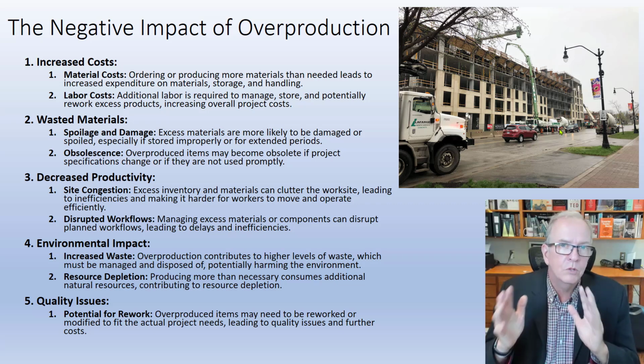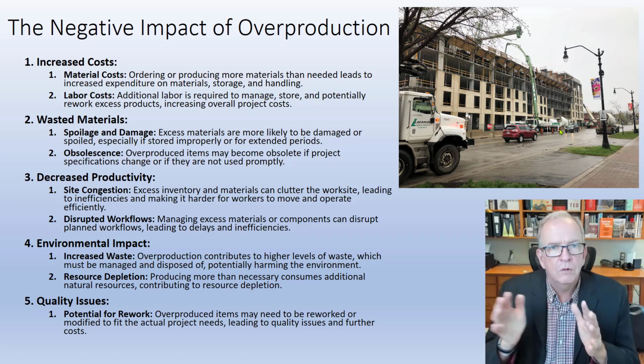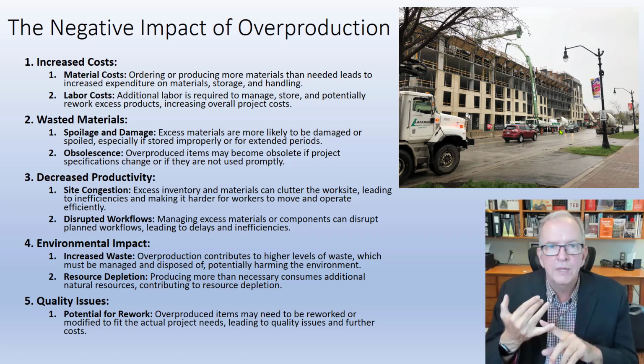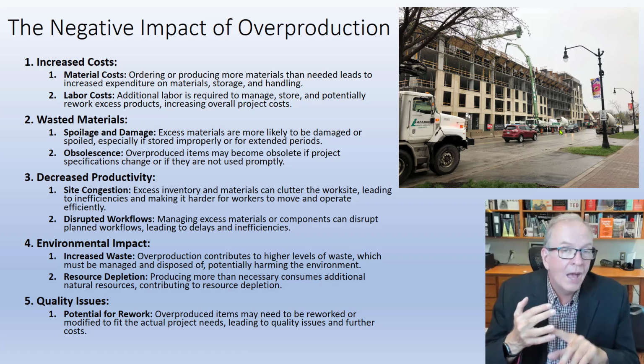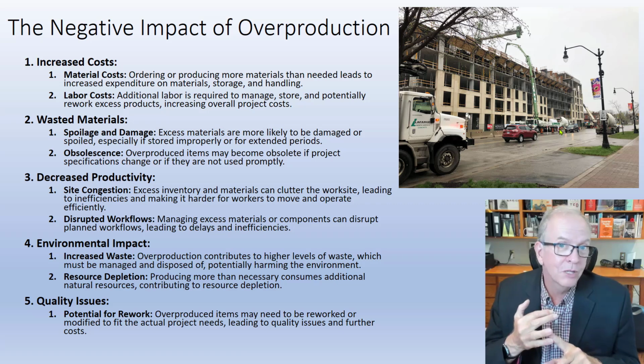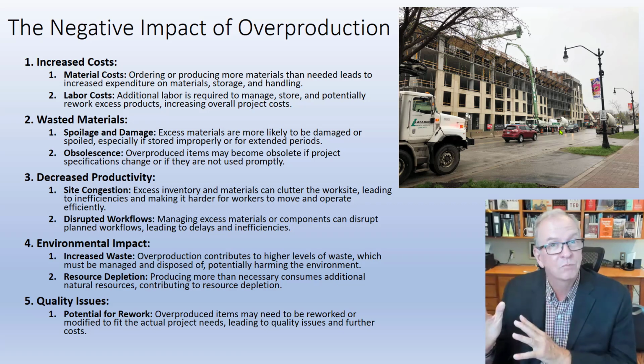So then if we want to do a little bit of what we call root cause analysis, it's okay, fine, we ordered extra concrete. Well, could we have done that in a more economical way, perhaps with gravel, perhaps with not having excavated too deep in the first place? What was the reason for that? And learning from that, that's continuous improvement.